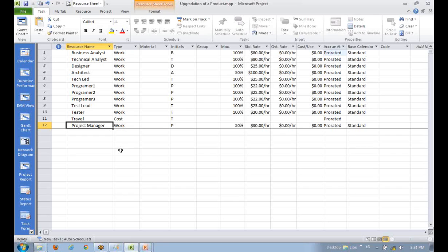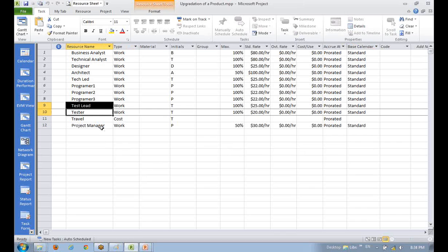If you are buying some licenses, then its cost will go at the start, because when the task is starting, before that you need to procure all the licenses or hardware, right? And that way we have defined our resources.